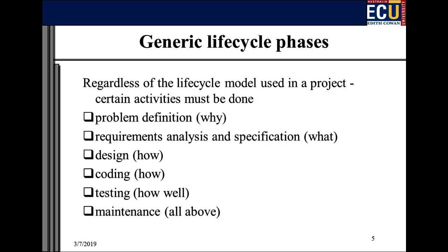And actually the unified process lays it out very well. It doesn't have these actual things as phases. It's got these things called workflows, which correspond to these things, and they last throughout the whole development life cycle. The actual phases, inception, elaboration, construction, transition, that's your phases. But in each phase, you're doing a little bit of this. Early phases, you do more analysis. Later phases, you do more of the build. But you're revisiting. And the good methodologies basically do that.